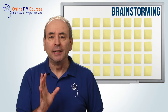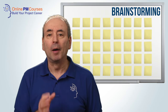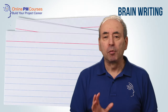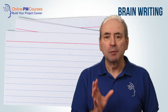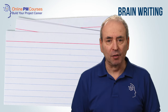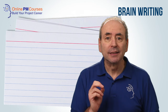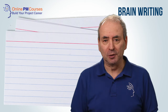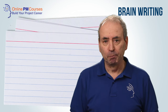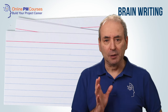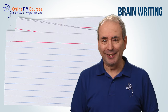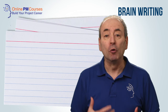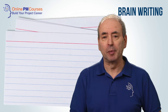Both of these problems can be overcome by my second technique: brain writing. Brain writing allows much more parallel processing of ideas. Everyone is contributing their ideas simultaneously, which makes it ideal for very large groups as well as small groups. It also overcomes bias because people are working on their ideas on their own without hearing and being influenced by others.